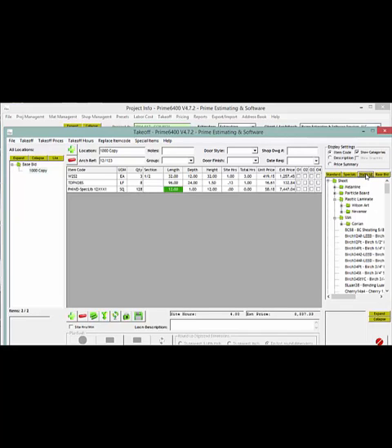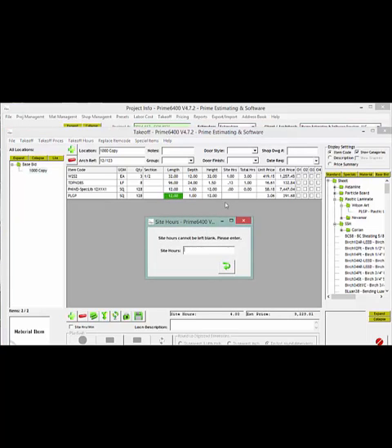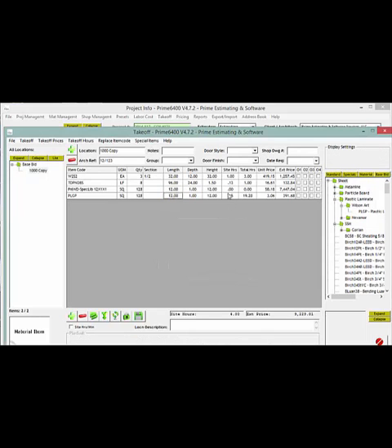We also have the ability to call in materials. Let's say we wanted to bring in some Wilson art. We can drop and drag that over. We can put in a quantity for that material. Now with material, it does not give us the hours of installation. They're not attached as they are in the assembly, so we're asked to put that in at this point in time, and it completes the row for you.